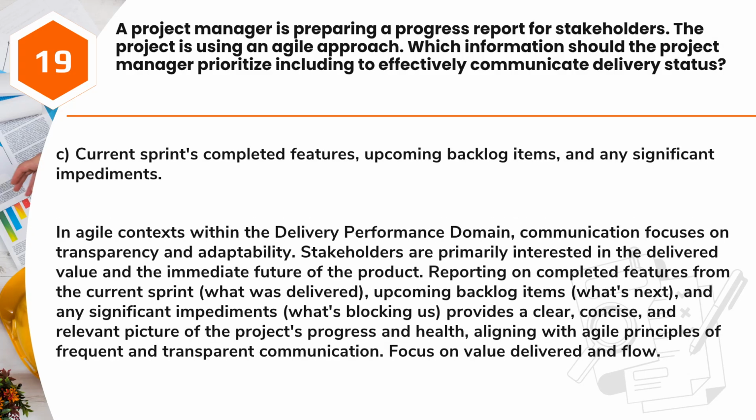Answer: C. Current sprint's completed features, upcoming backlog items, and any significant impediments. In Agile contexts within the delivery performance domain, communication focuses on transparency and adaptability. Stakeholders are primarily interested in the delivered value and the immediate future of the product.